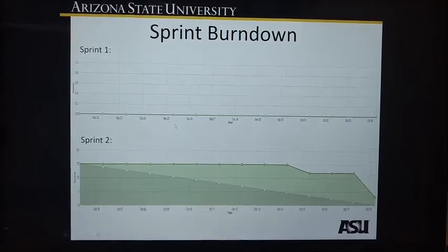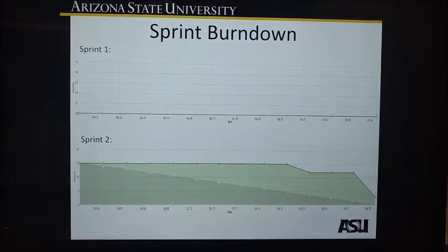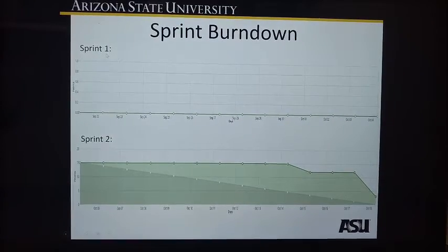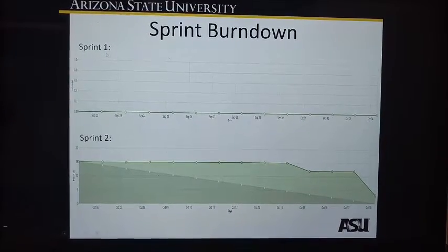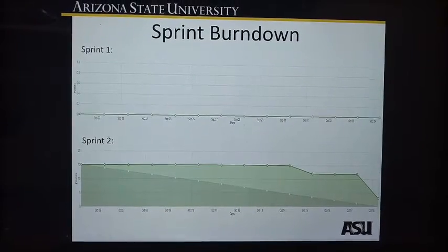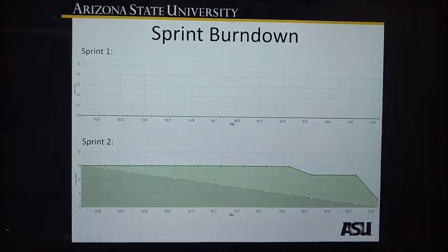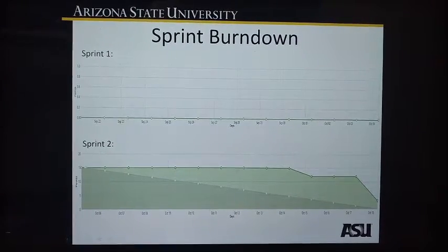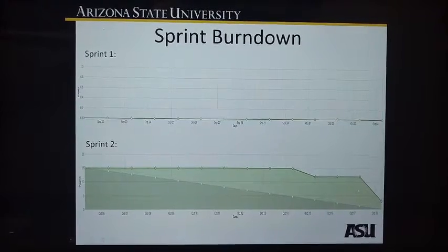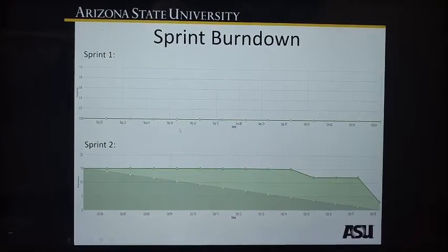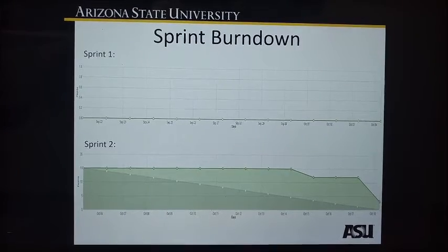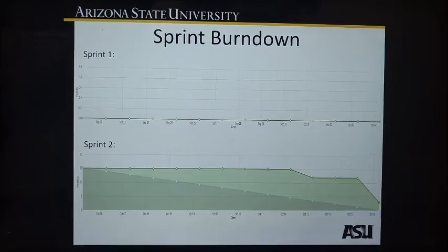Talking about the sprint burndowns, in sprint 1 we spent most of our time on research and requirement elicitation, and we had user stories related to the environment setup and database schema. We did not assign any points to them, and therefore the burndown is flat. For sprint 2, we picked up 5 stories. Since these user stories were not completely modular, the burndown is not to scale. This is in fact one of the challenges we faced in sprint 2, and we will focus on grooming the product backlog in a better way.